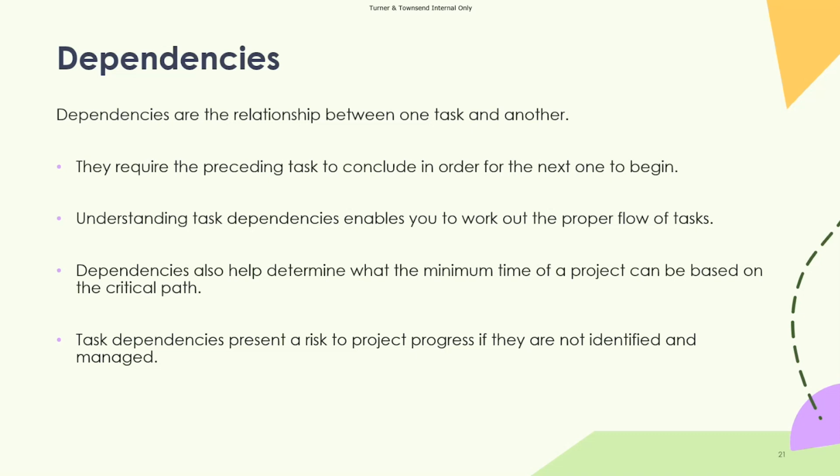There are also things like PAS 2035 assessments, so you're not going to be able to carry out the works until you've had those assessments done to the properties. You're not going to be able to close off a project until a project has been lodged. So again, linking to the different critical paths and being able to achieve milestones.